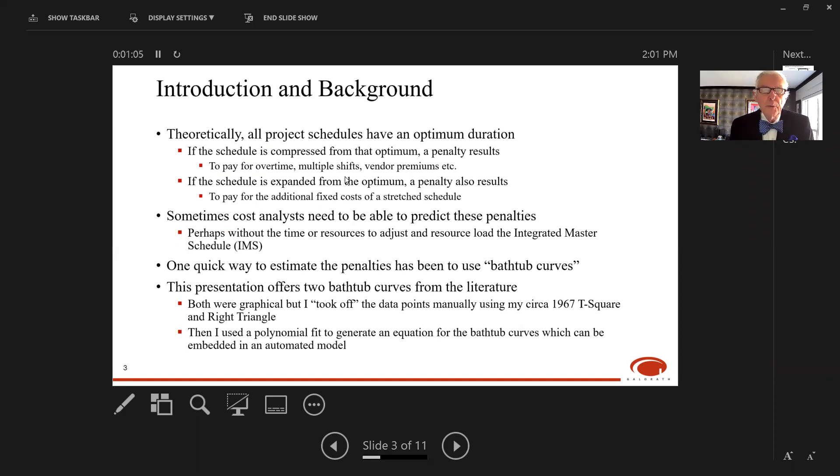Sometimes as cost analysts, we need to be able to predict these penalties, and maybe we don't have time or resources to adjust the resource-loaded integrated master schedule. We need a quicker way. One quick way that's been used in the past is bathtub curves. This presentation will offer two bathtub curves from the literature. I used a polynomial fit to generate equations that could be embedded in an automated cost model.